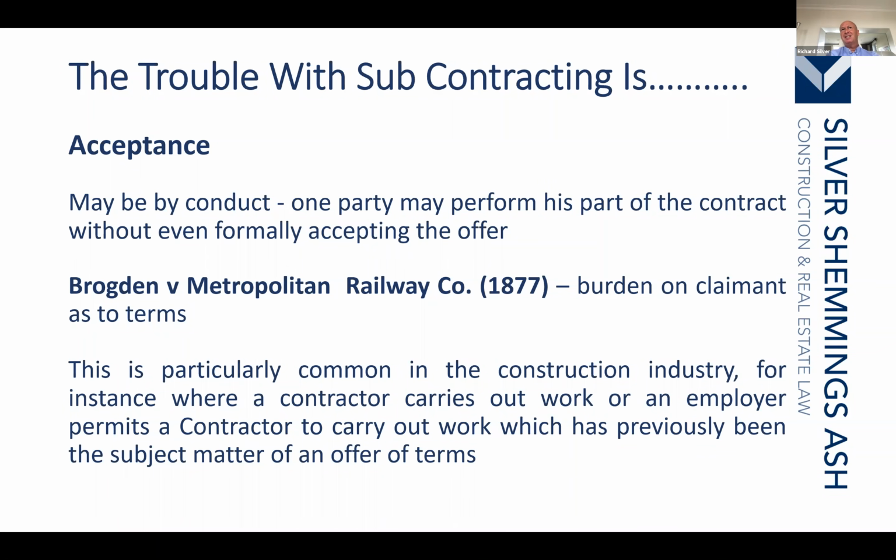By the subcontractor sending their letter saying they don't agree to the subcontract, they've rejected it. So the subcontract cannot possibly be in place. But the subcontractor suggesting that their terms apply has made a counteroffer. By the contractor allowing the subcontractor to commence on site, the contractor has accepted by conduct the subcontractor's terms.